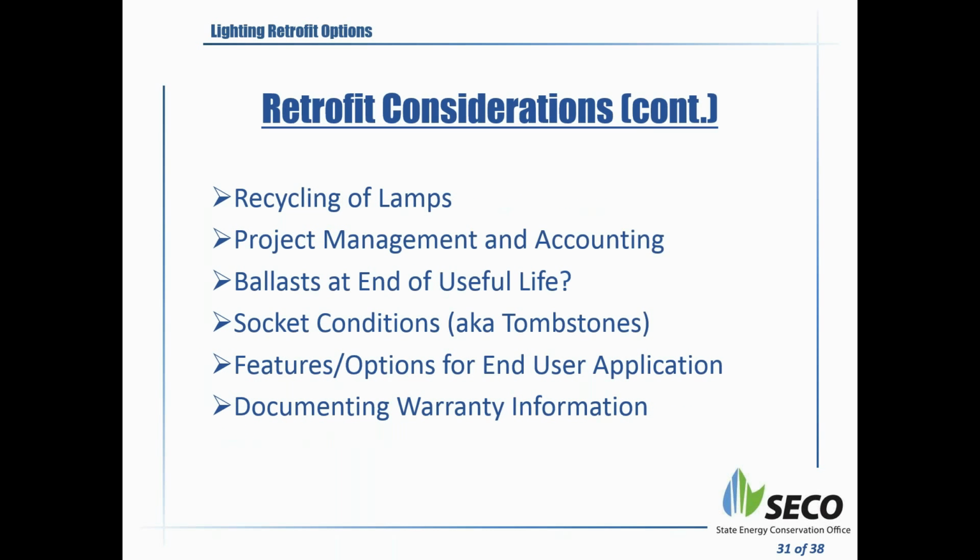If you are a small facility, probably not, but if you're a small school, you become a small quantity generator, so it's better to recycle the old T8 lamps that you get out of these facilities. Project management and accounting is almost as important as the specifications, and the design portion of it is maybe 20 to 30% of the effort. Almost 70% of the effort is managing this project because of the nature of the retrofits. It's just hard to keep up with the changes and account for all the changes.